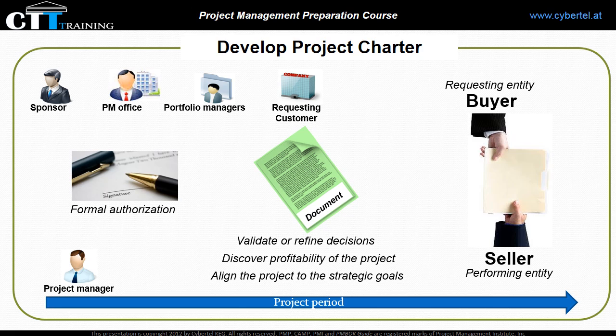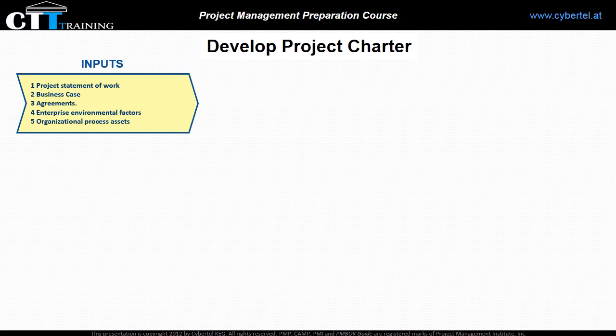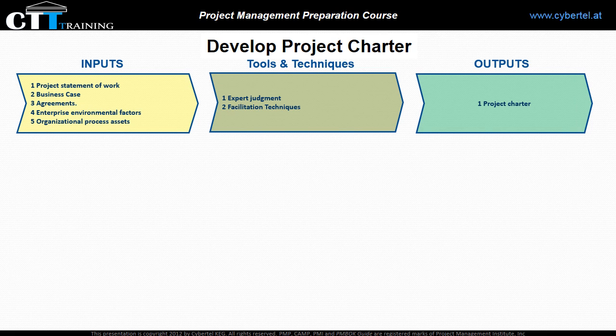Correct. But don't forget, a project charter is not considered to be a contract, because there is no money promised or exchanged in its creation. As I mentioned before, in each process you need some inputs to deploy the tools and techniques to get the output. In this case, the project charter.